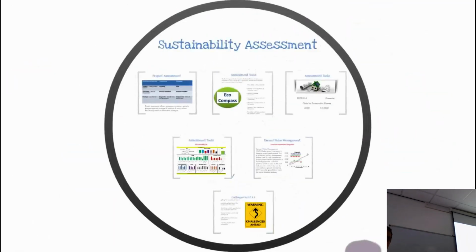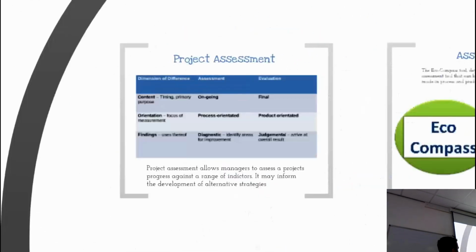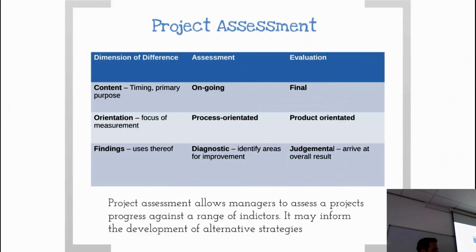To give you some examples of the kind of tools that are used for assessment, first off, we'll just get this out of the way: the difference between assessment and evaluation, as you said very well. Assessment is ongoing all the way through, while evaluation is at the end. Assessment is generally process orientated. Are we actually going through the right steps to achieve the outcomes we're supposed to achieve? Whereas evaluation is, did the project or service actually, was it a good thing to do? Assessments are also diagnostic, so you can identify areas for improvement, and you should be able to improve your project and tweak it as you're going through it to make it work. Whereas the evaluation is much more judgmental, an overall result at the end of it.